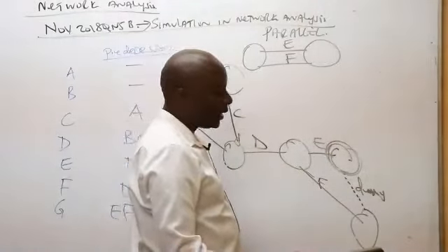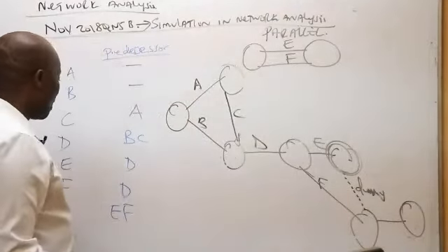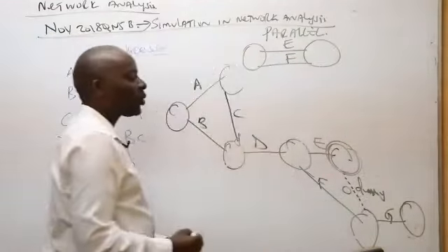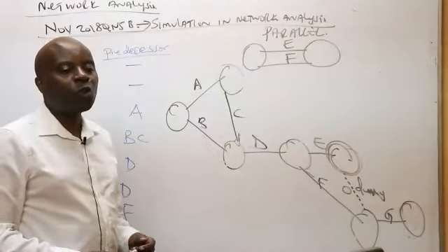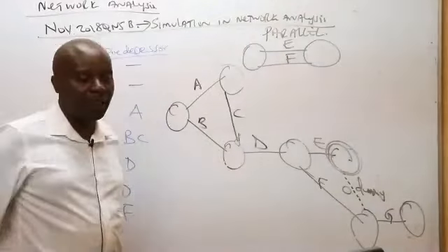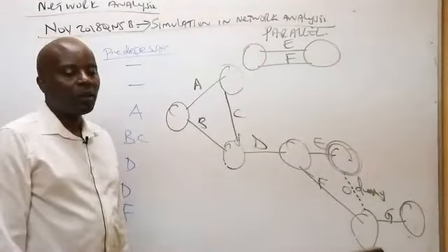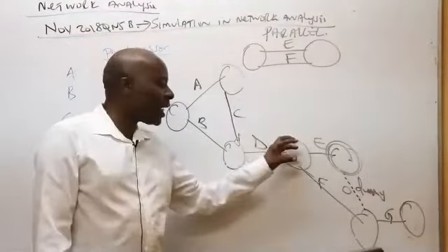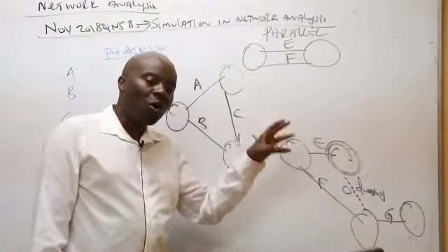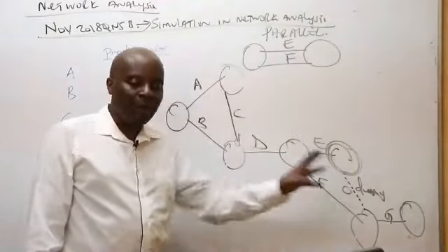And once both have ended there, now I can pull my last activity known as what here, somebody? Known as G. Remember that a dummy is a non-existent activity, which does not consume any resources. So besides the dummy, I must always put what there, somebody? 0, like that. So whenever I realize that two activities are sharing the same start, and I would want the two to end together, then the only way out, ladies and gentlemen, is to introduce a dummy.